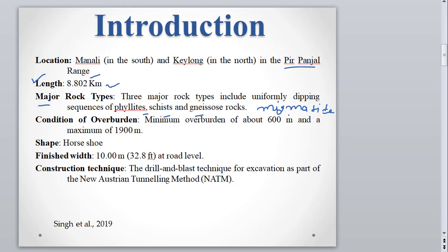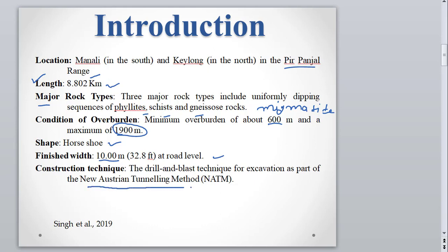There was a delay in the commissioning of this tunnel. The minimum overburden was 600 meters and the maximum was 1900 meters — a very high overburden cover. Due to this high cover, there were problems from de-stressing of the rock. The shape of the tunnel is horseshoe, with a finished width of 10 meters at road level. The construction technique used was the New Austrian Tunnelling Method, also known as NATM. This data is taken from Singh et al. 2019.